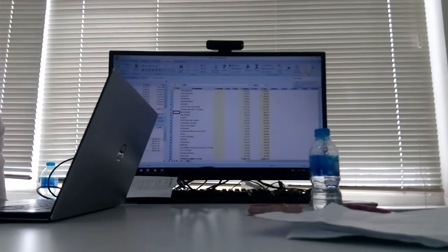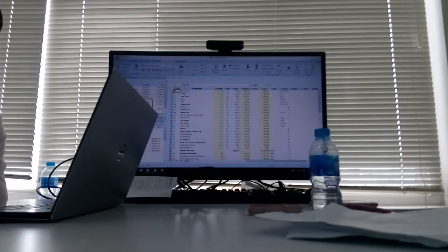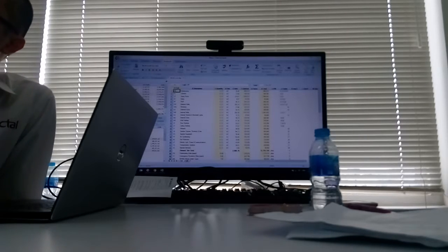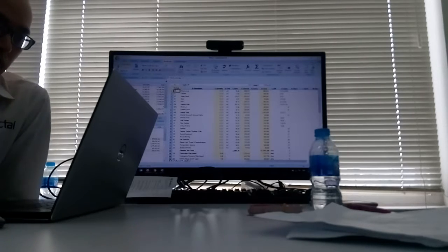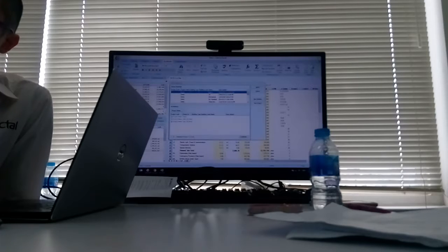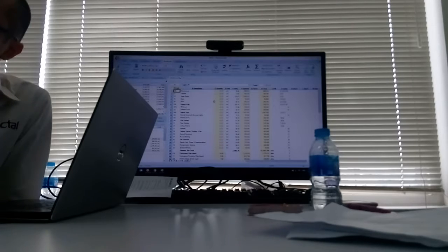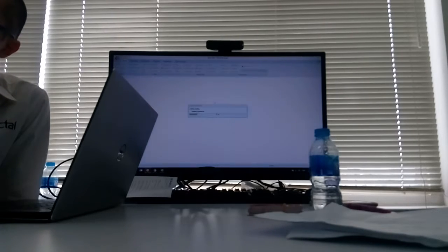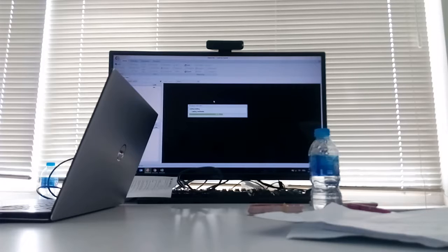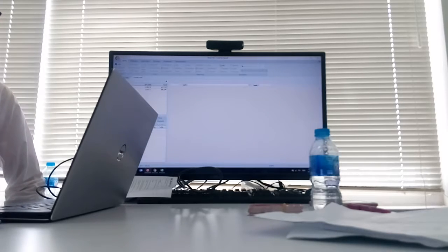Within that workbook, we've got the drawing revisions, which we've been through earlier, and we can manage variations automatically through the reporting function. So we can say, all right, drawing revision 1 has changed the size of such and such a room. Drawing revision 2 has a different floor finish here. Drawing revision 3 has a different ceiling height. And then we can automatically put the cost of each one of those changes into a report.